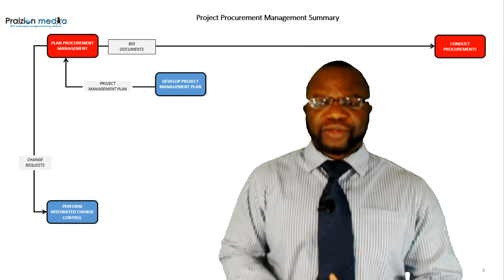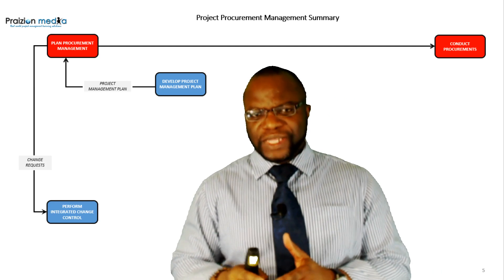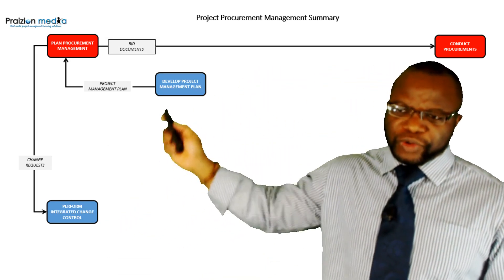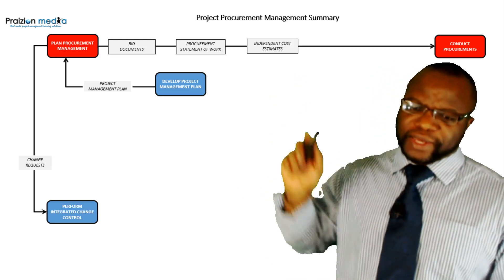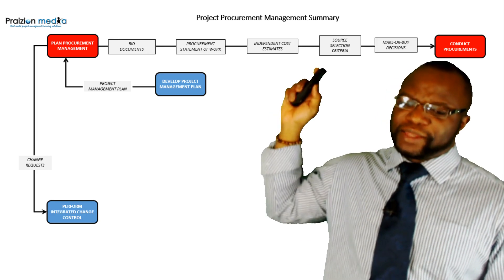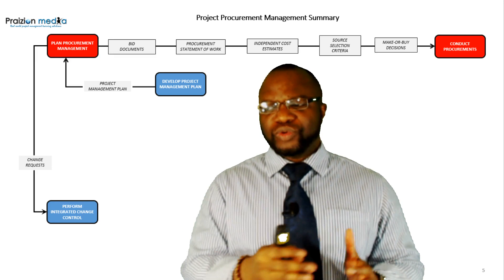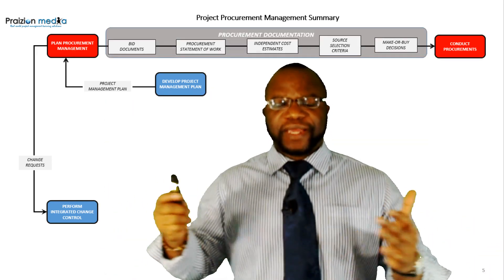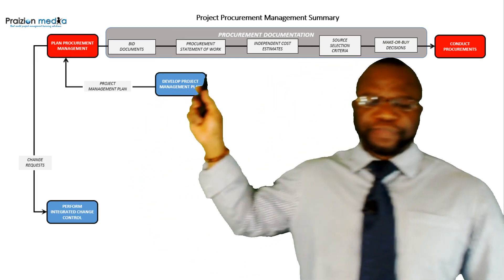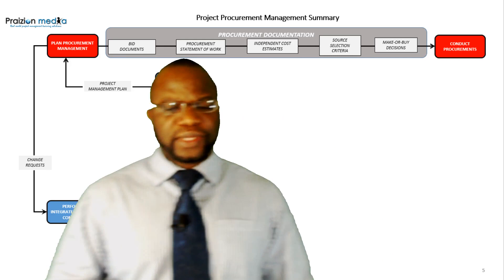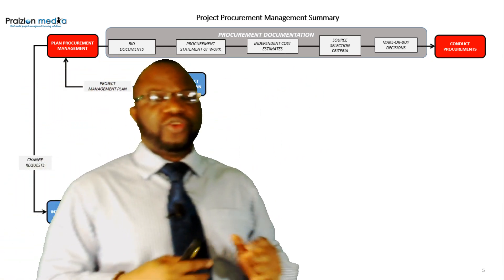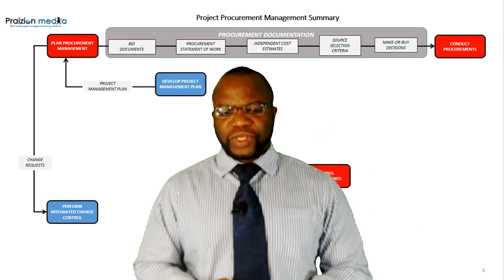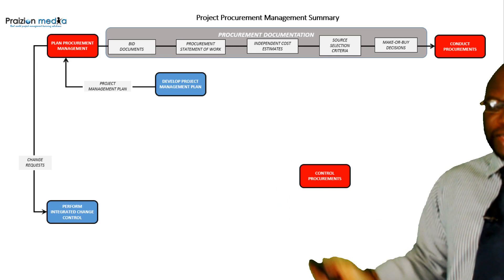If you do not pay close attention to those seven outputs and you're not tracking each one, it's easy to miss these connections. That's why in this solution I show you: the bid documents, the procurement statement of work, the independent cost estimates, the source selection criteria, and the make-or-buy decisions — they are all going to Conduct Procurements. I look at all of these together as procurement documentation. This type of relationship you typically don't pay attention to while reading the PMBOK guide, but in this curriculum I call it out for you.